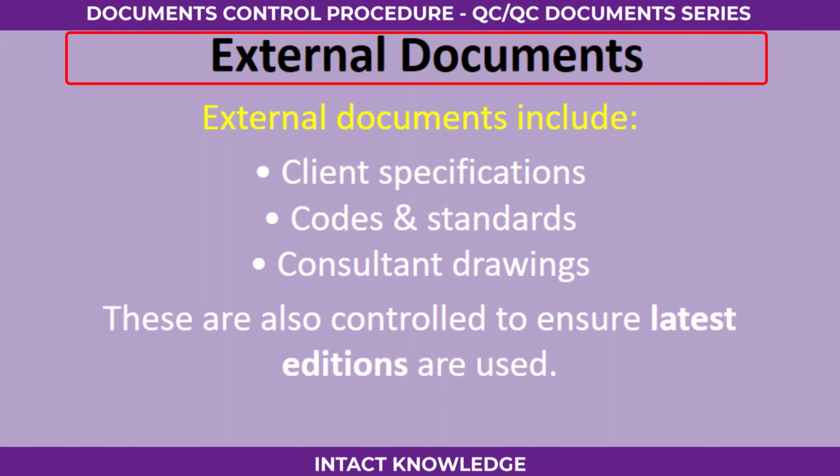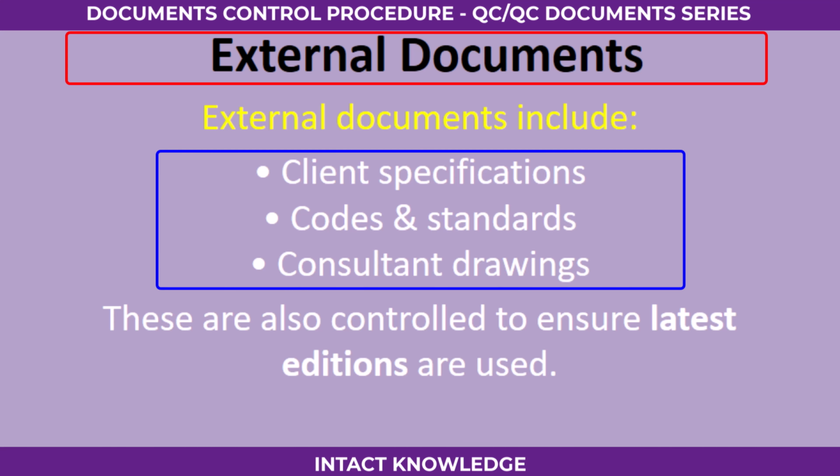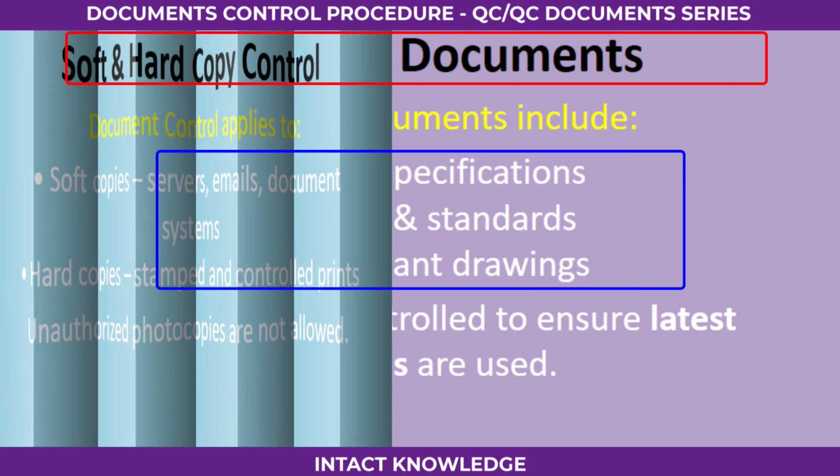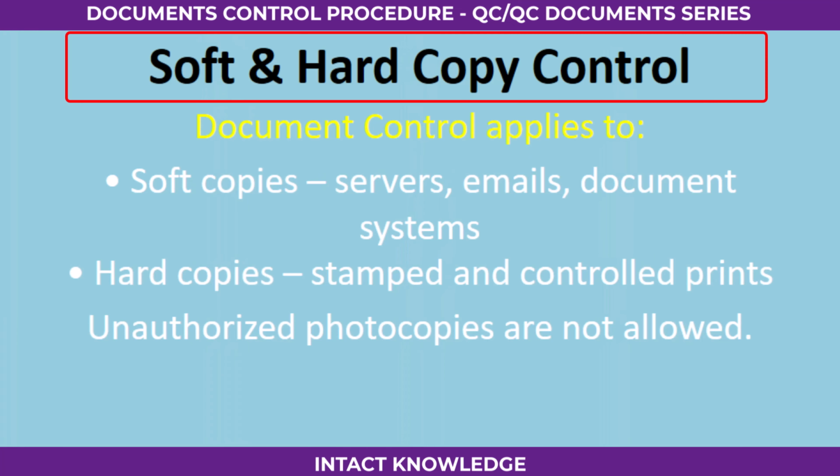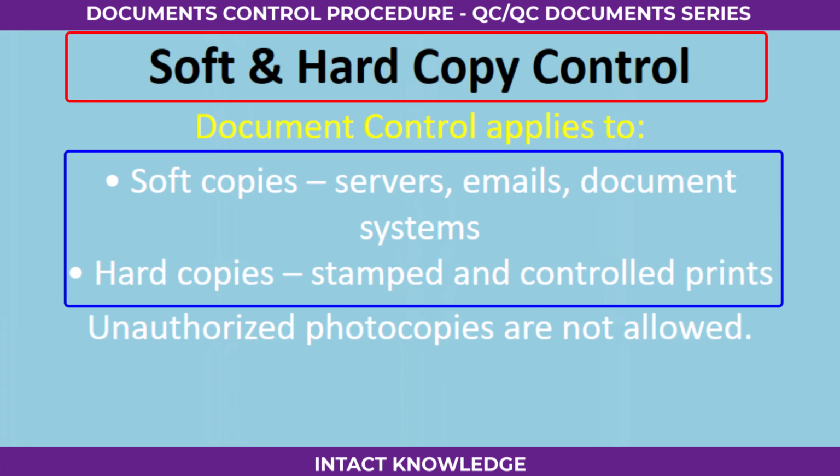External documents. External documents include client specifications, codes and standards, consultant drawings. These are also controlled to ensure latest editions are used. Soft and hard copy control. Document control applies to soft copies, servers, emails, document systems. Hard copies, stamped and controlled prints, unauthorized photocopies are not allowed.